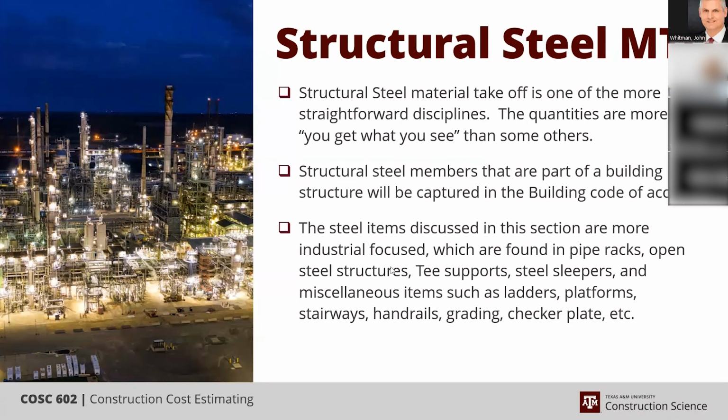So what we normally do is prorate a handful of short loads into the overall concrete value when we're building our pricing. I know that we've also done that by just adding a waste factor instead of adding the short load fees. It's just another way of doing it. Yeah, it's legit. It's a legitimate practice. If that's how you want to account for it, and you've actually thought that through, then I think it's a very legitimate way to approach it.